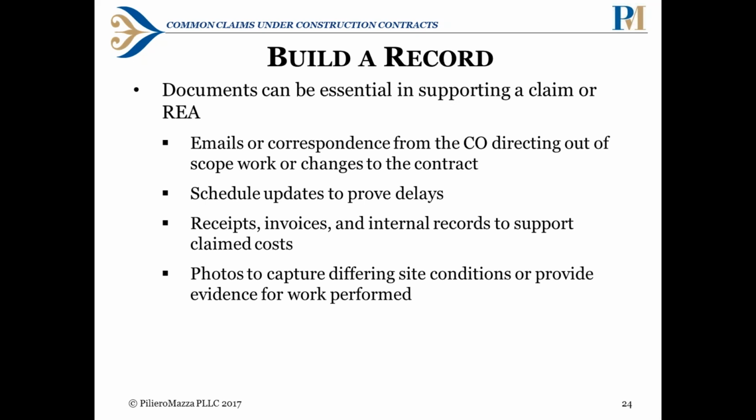And then photos to capture differing site conditions or provide evidence for the work performed. The photos can be helpful as conditions change over time, so you want to make sure that you have the evidence for what was going on at the time of the change to verify that when the REA claim is eventually filed, which can be much further down the road.